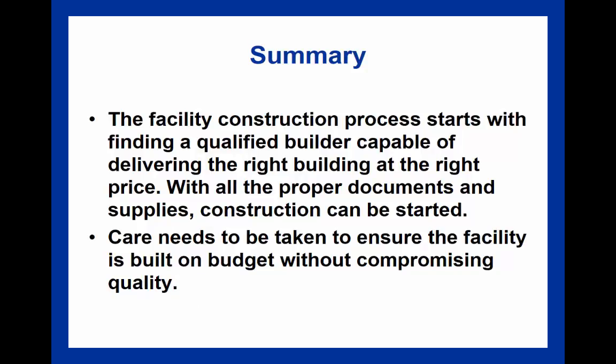But from a general perspective, the construction process really starts with finding a qualified builder who's capable of delivering the correct building on time and hopefully under budget. And proper documentation and supplies is necessary. Now, things like an ironclad building construction contract, and then making sure that contractor is properly bonded, can be very important in saving the owner time, money, and worry.